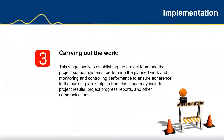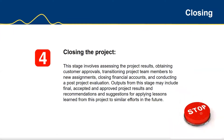Let's look at stage three. The on-site team should be established and a site project manager selected to lead the installation, commissioning, and validation activities on site. It's very critical that you move in conjunction with your project plan. Outputs may include project progress reports and other communications — weekly meetings, for example — to achieve the desired installation, commissioning, and validation. Then we move on to the closeout of the project.